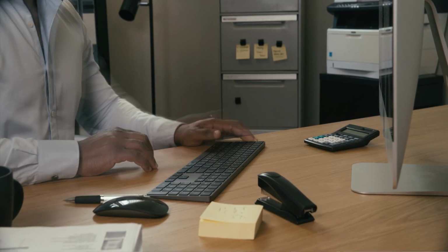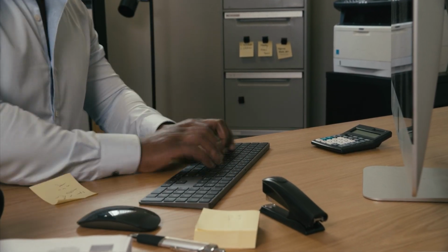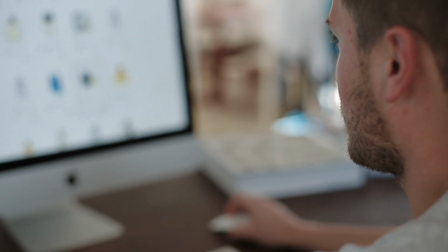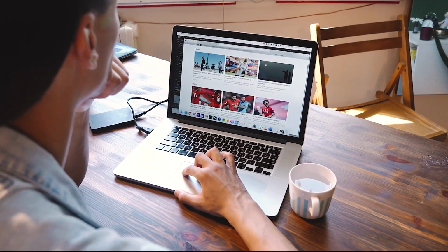So start with one function, and this is the order that I would set up systems for my clients. I do this for clients where maybe they've got some new software, whether it's like Builder Trend or Procore, Contractor Foreman, Jobber, House Call Pro. There's a whole bunch of good ones out there. But generally, the first thing that you want to set up is your estimating, right? That's one of the first things that you want to be able to do in your software, is get the estimating down, setting up cost codes, setting up your items, your pricing, your proposals, how they look, your landing page, if you got a landing page that brings them to the proposal. So getting the whole estimating part of it, that's where I'd focus first, because that's where you're going to be starting new clients in the system of your project management software. So make sure your estimating is running smooth.